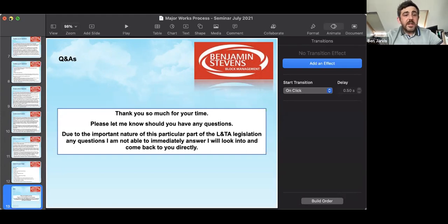And then we get to the final part where we can release our admin fee, where we can demonstrate to the client, and all the other stages are noted accordingly and signed off. We can release our payment, the contractor retention payment on completion of any snagging, and then an important part really as well for the projects and for the file for future reference to go back to is getting that client sign off. As much as we got the client approval to go ahead with the project, we also would like to get in writing that they're happy that the project seems complete, and we can put that all with the folder. Get all the information together step by step.